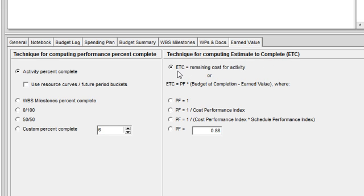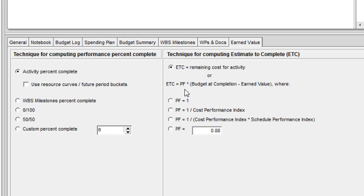As it stands now, my ETC is being calculated or is represented by the remaining cost for the activity. You will see, though, that there is another strategy where you can calculate ETC using a performance factor times budget at completion minus earned value.